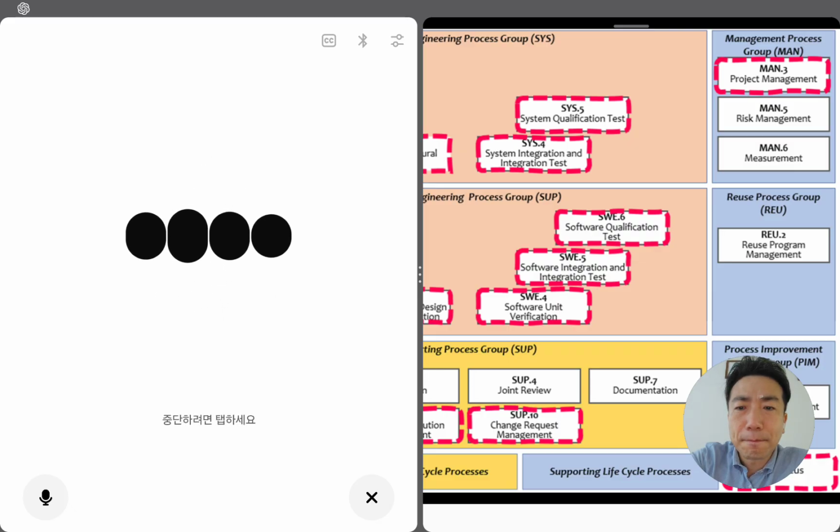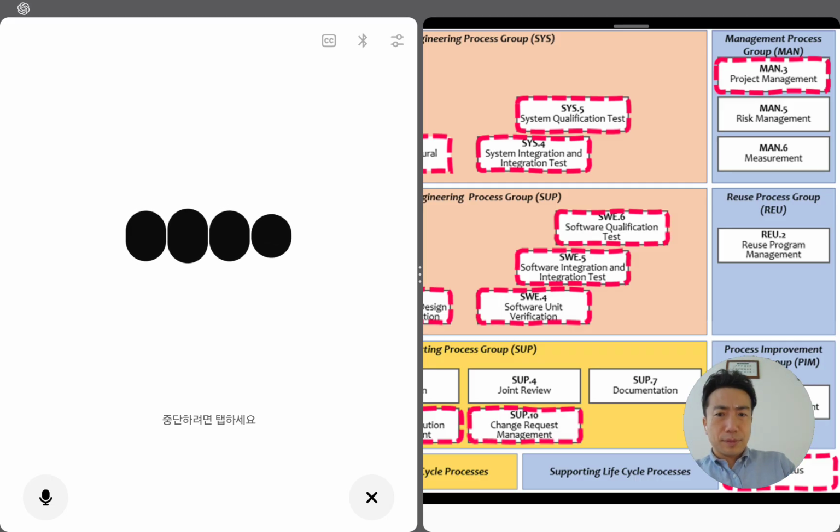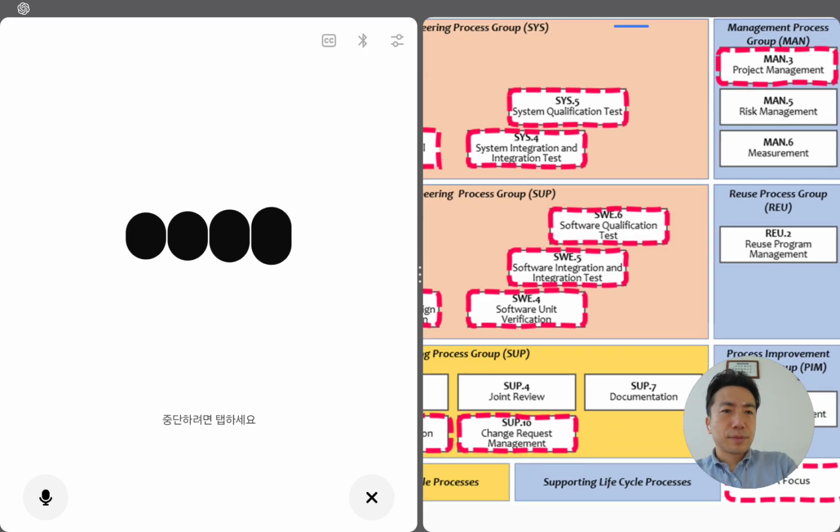I can't make an actual Excel file here, but I can show you exactly how it should look so you can copy it straight into Excel. Think of these columns. Column A, item name, like project plan, requirement specification. Column B, description, purpose. Column C, owner, responsible person. Column D, version, revision. Column E, baseline date. Column F, storage path or location. Column G, change control method, for example via CCB, auto version in SVN. Column H, remark, like audited, pending update, etc. Then each row would be one configuration item.